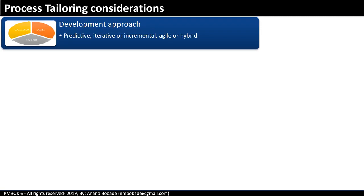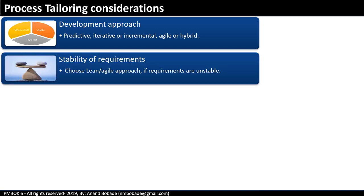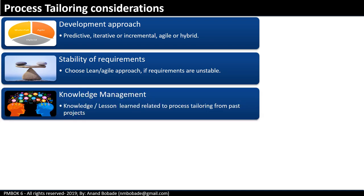Process tailoring considerations: some key areas that lead to process tailoring are — development approach: the project manager will define the development approach in the project management plan, which might be predictive, iterative, incremental, agile, or hybrid. Stability of requirements: the approach will be defined based on the stability of requirements; the project manager will choose a lean or agile approach if requirements are unstable.